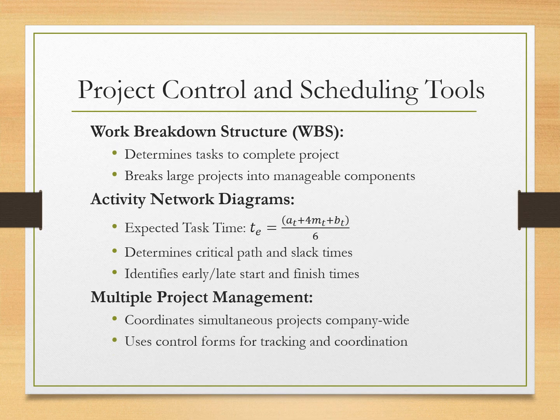Let's talk about keeping projects on track. The following tools sound technical, but they are incredibly practical. Work breakdown structure breaks a large project into manageable components. Instead of "plan the campus event," we would break it into secure venue, arrange catering, promote event, coordinate volunteers, and day-of logistics. This prevents forgotten tasks and reduces overwhelm.